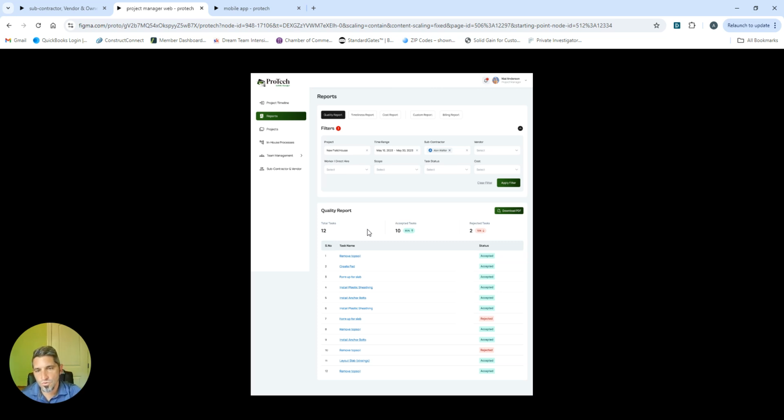But what this is going to show you is a percentage. It's a value grade. Okay, so this guy was assigned 12 tasks. 10 were accepted the first time, and 2 were rejected the first time. So that gives him a score of, I think that says 85%, okay? Meaning that his value rating is 85%. This is very crucial for determining if you want to work with that subcontractor or vendor again. And it's also a way of holding them accountable for the work that they do.